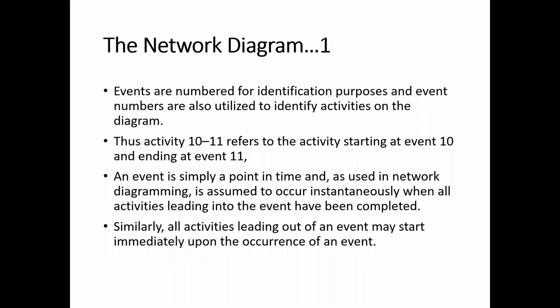The pouring of the concrete can only be done after the formwork and the reinforcement have been completed. So we know certain logical relationships between the activities, and using those relationships we can represent the activities in some form.